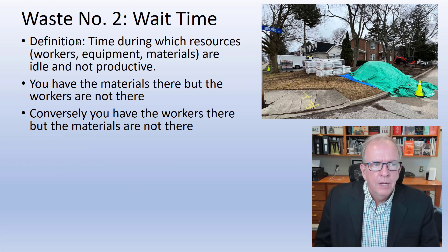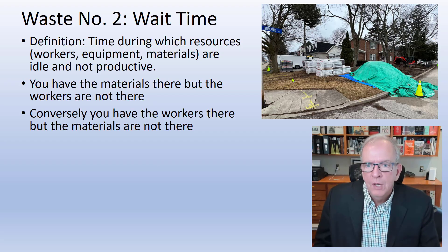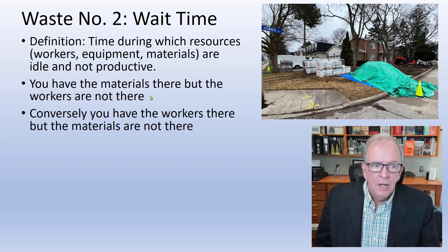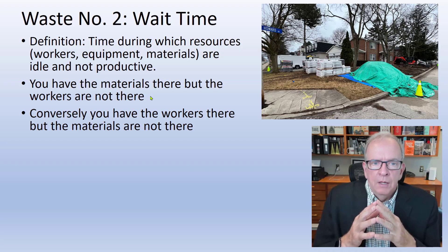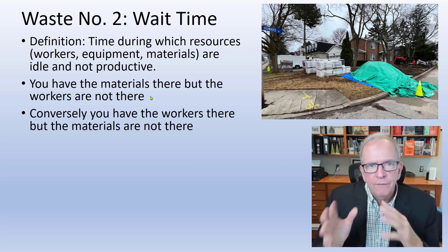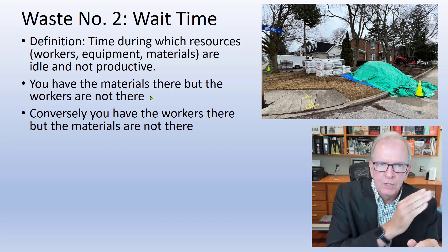Wait time is defined as the time during which resources — workers, equipment, and materials — are idle and not productive. In this photo there are a lot of materials and equipment but no workers; it may be sitting there for days or weeks. In construction this is a big one. It's not that you have to work faster — you have to have a more continuous flow on your project. That's what you're working towards.